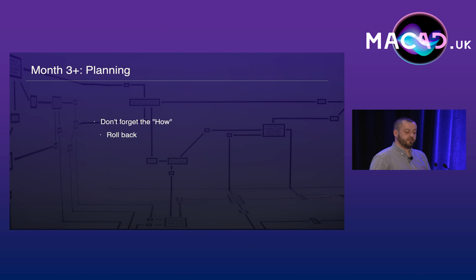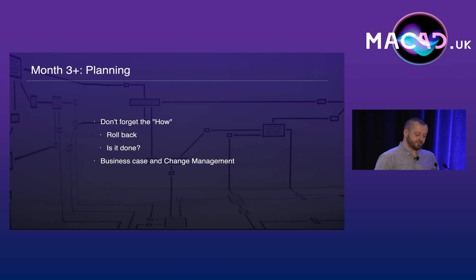Consider detailing the success criteria of the work, so everyone is on the same page as to when the project or phase is complete. This will help you avoid projects and changes being left in sort of a half limbo of, is it done, is it not done? All this will form both the business case and, for most people, all the information needed for a change control request. Turns out they do actually have some value.